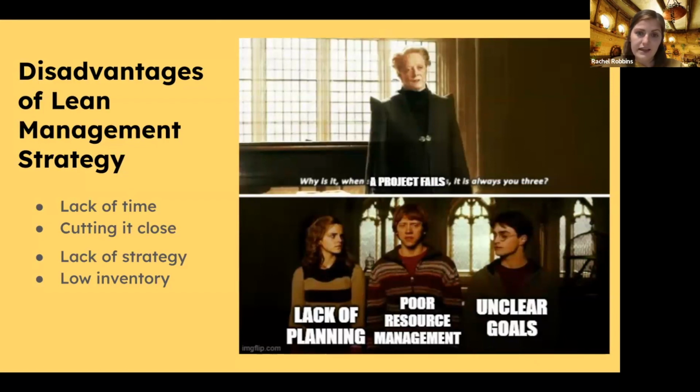Cutting it close. In Lean project management, things and products are only being delivered as needed, which can lead to problems or low resources. And when I mean resources, I'm talking about team members. A team member can be out sick or having an emergency at home and need to step out. And because they are tasked with a certain part of the project, things can run behind schedule and you could inevitably be cutting it too close to your project deadline, which can lead to stress on team members and or burnout.